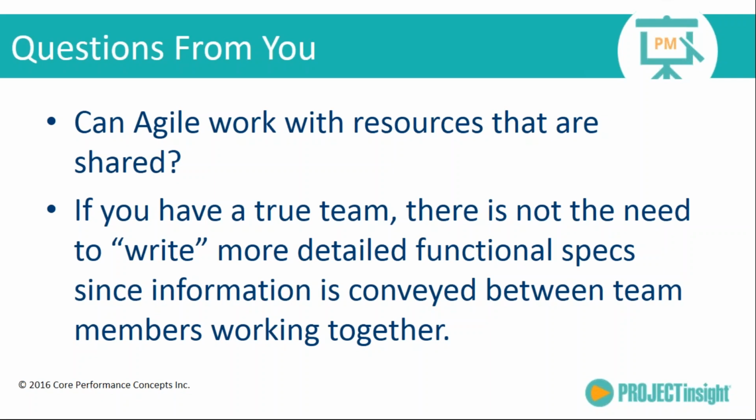We have a typical waterfall kind of project methodology, but within the technical engineering area, we use more of an Agile. And resources are absolutely shared. But what needs to happen when you do something like that is you need to be coordinating across the resource owners. And when I say resource owners, the different projects that might be utilizing those same shared resources.